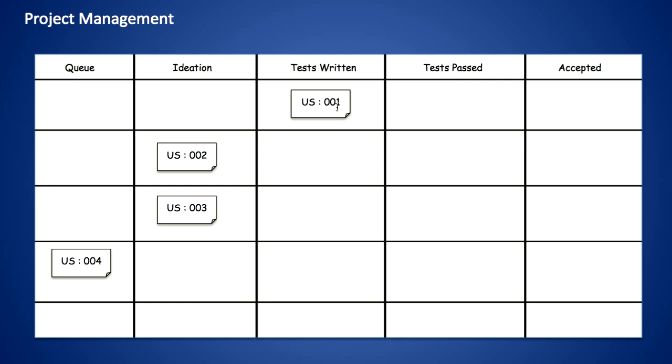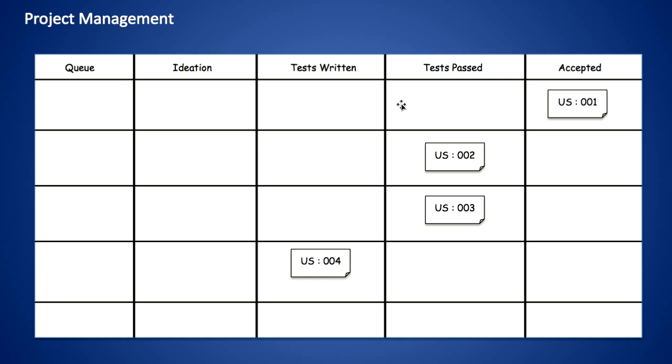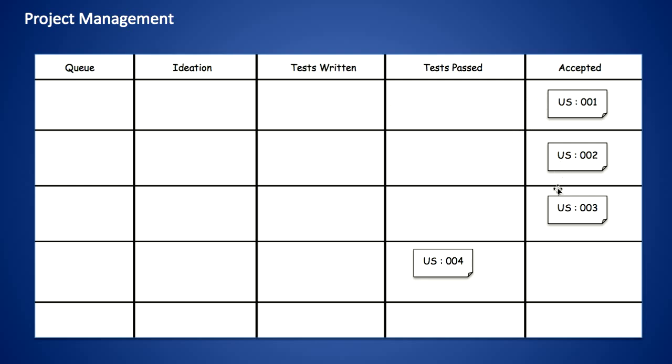This is an example of quite a mature process. Development proper can begin, the tests begin to pass, and the customer accepts those tests. When all the tests have passed and the customer has accepted all of those user stories as being satisfactory, then the job's complete. Here we can see the progression of how we track the progress of those user stories across our Kanban wall.